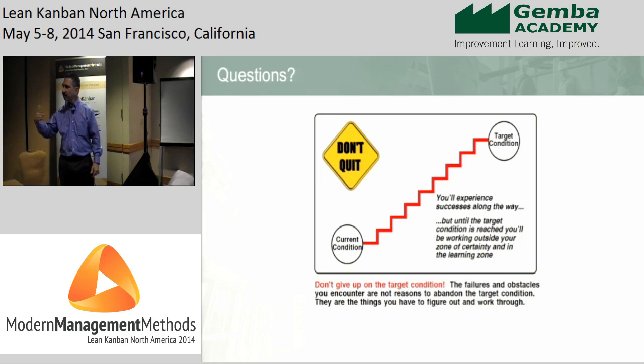And so it does create that sense of ownership. We don't own the planning system. The team owns the planning system. We use a phrase that we call tact planning, and it's basically a rhythm-based planning system. Every worker, you go out and walk on the floor, everybody's talking about I'm on level 4 tact 1. That's the language of the team. That's the craft workers, not the supervision, that are talking that way.